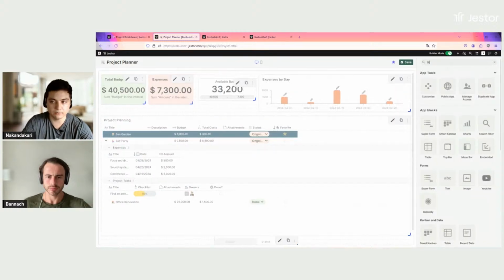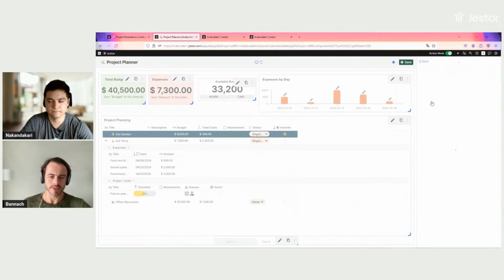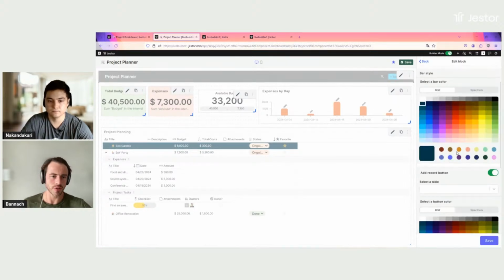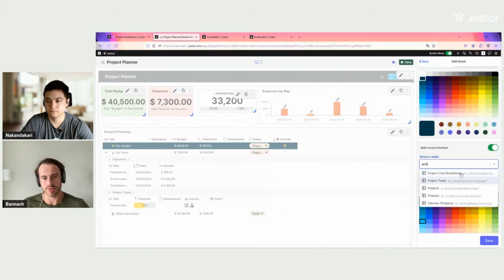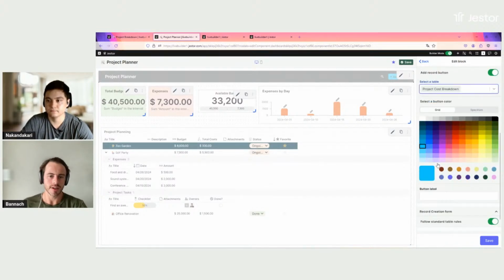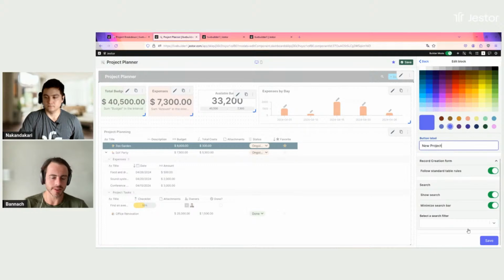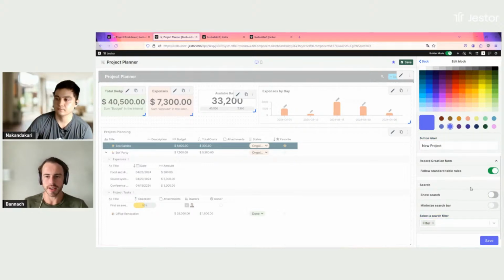So now I'm going to create a title bar. And you could also have one that's, for example, over budget. All the projects that are over budget. So with just one click, you can see all of them that are over budget. Basically, you can use formulas also inside Gesture, so you could calculate the current expenditures and the planned ones. If it's more than zero or if it's negative, positive, depends on how you want to do your calculation. Then if you click, it will only show the ones that are over budget, or maybe if they are delayed for some reason, or any kind of filter that you want to pre-program. You can use the filter magnet for this, or you can just use this for other reasons, maybe to check dates and so on.